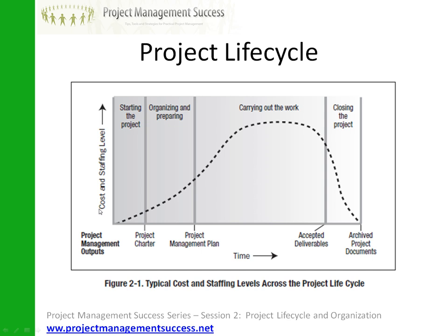This also shows you the cost and staffing level. Costs theoretically start out lower. They get higher during this phase here, and then during the actual work, it's the bulk of the cost of the project generally. And then costs drop off again over here.